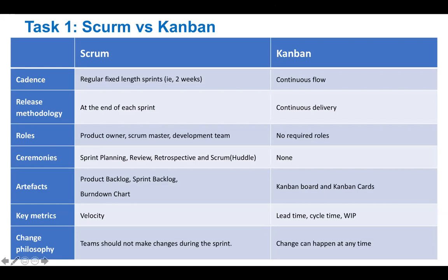When we talk about the change philosophy, Scrum says teams should not make changes during the sprint. You can change after, you can change your teams, you can get more people in, that's fine, but not during the sprint. When you're working on a sprint, you have to deliver things within a particular period of time.